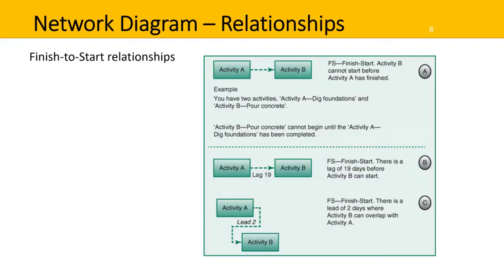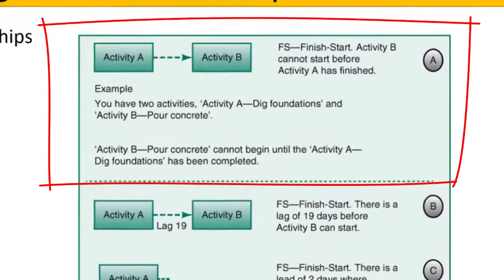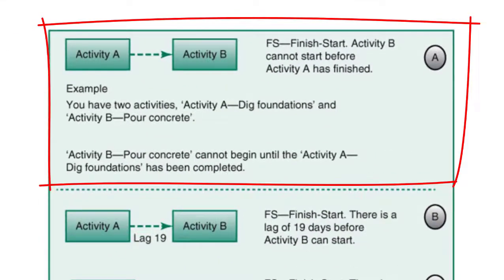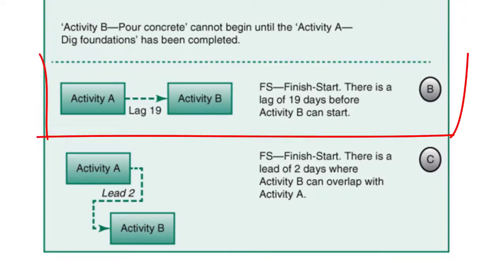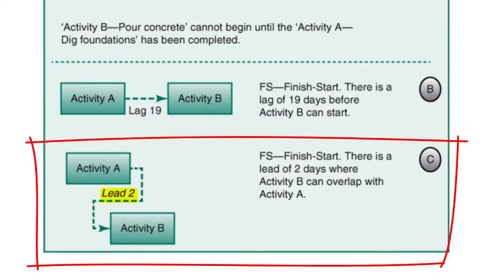These are examples of finish-to-start relationships. Up the top in A, activity B cannot start before activity A has finished. For example, activity A is dig foundations and activity B is pour concrete — activity B cannot begin until activity A is completed. For B, there is a lag of 19 days before activity B can begin. And for C, there is a lead of two days where activity B can overlap with activity A.